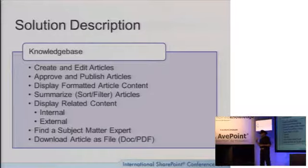Until I finally said, enough's enough. We can't do this anymore. You're throwing money down the drain. We have to stop and fix this problem and refactor this whole process. So we took 3 months out of the development cycle and went back to identifying roles and responsibilities, a change management process, features and requirements gathering to build them exactly what they wanted with input from the business telling us how they wanted to see things.